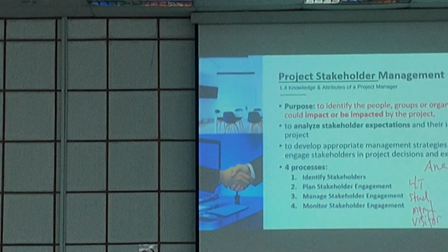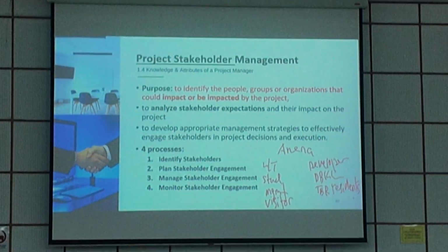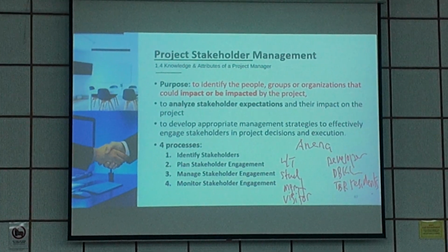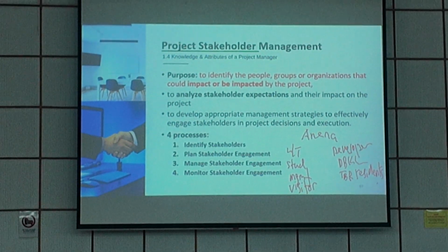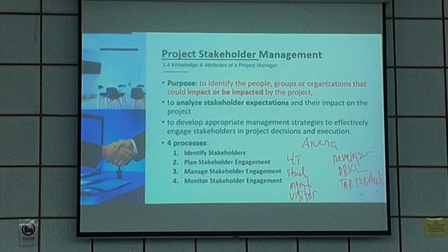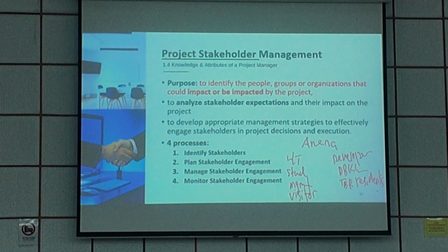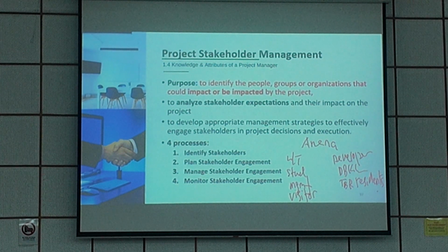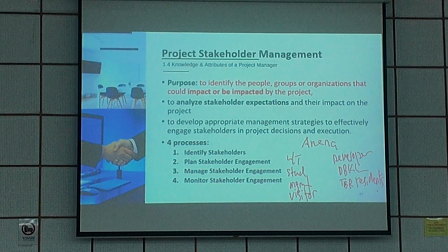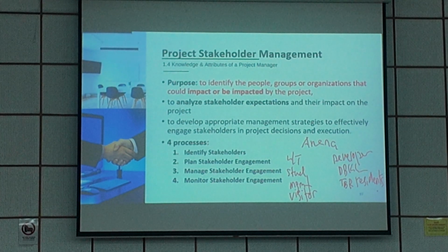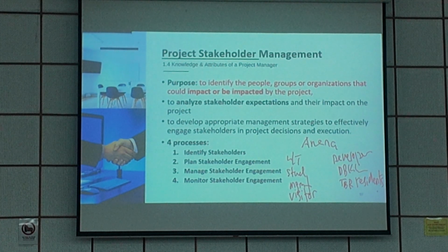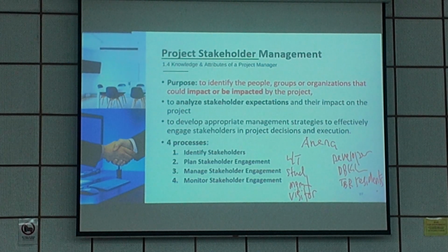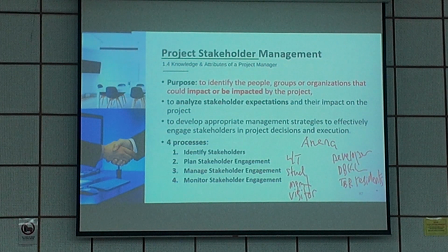The residents, correct? They are impacted by the project because so many lorries coming in and out are affecting their lifestyle. And they resist the project. If you don't take care of them, they'll complain, and if they go to DBKL to complain, DBKL will come. This is what a project manager wants to avoid.